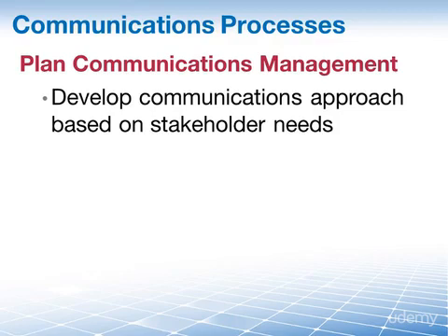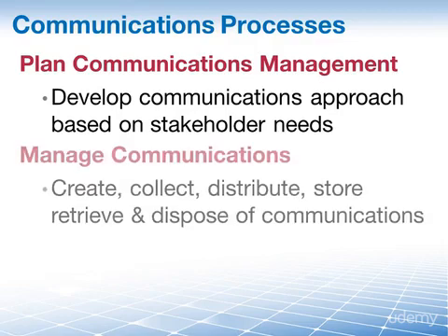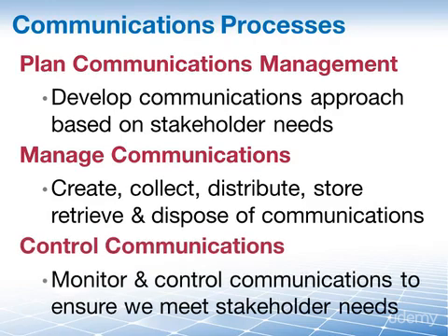Let's look at the definition of these three processes, beginning with Plan Communications Management, which is the process of developing an appropriate approach and plan for project communications based on stakeholder information needs and requirements and available organizational assets. Manage Communications is the process of creating, collecting, distributing, storing, retrieving, and the ultimate disposition of project information in accordance with the communications management plan. And finally, Control Communications, that is the process of monitoring and controlling communications throughout the entire project lifecycle to ensure the information needs of the project stakeholders are met.